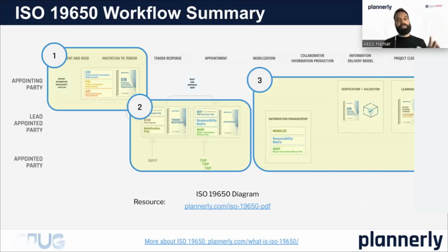There are starting points and templates that Planoly is being shipped with, but the best practice is to start creating your own templates, to start formatting in a way that works for you, adding content to it, deleting content, whatever turns them into your templates, and develop them over time from project to project. So lessons learned and incorporating these lessons from every project into a template, which template is going to be used for the next project, I think is crucial for the continuous learning as well.